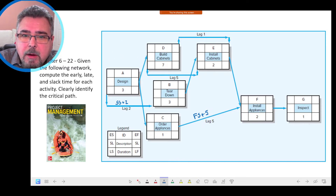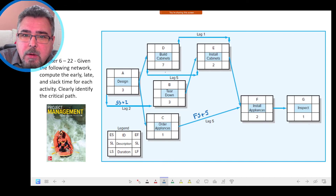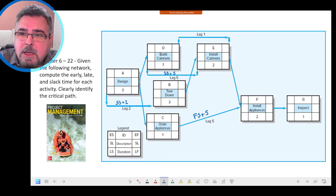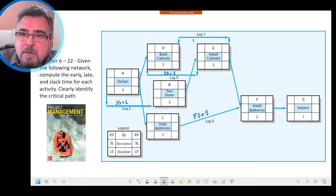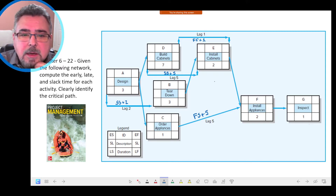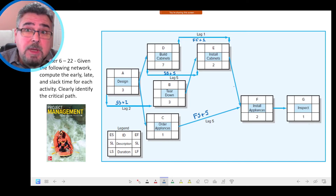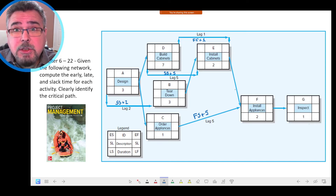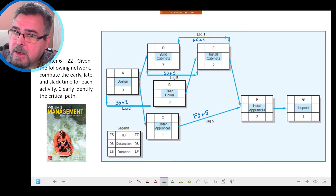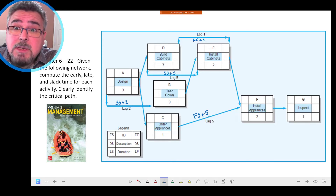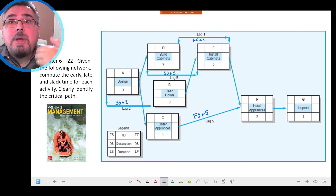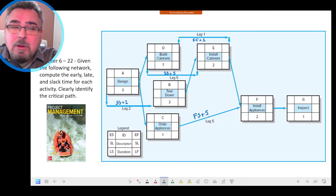Here we have another arrow connecting the start of Activity D to Activity E, and that is Start-to-Start plus 5. Then we have another relationship connecting the finish of Activity D with the finish of Activity E, and that is a Finish-to-Finish relationship with a lag of one day. The ones with no symbol are Finish-to-Start without any lag. On top of the arrow you have a symbol that reinforces the information about the relationship.